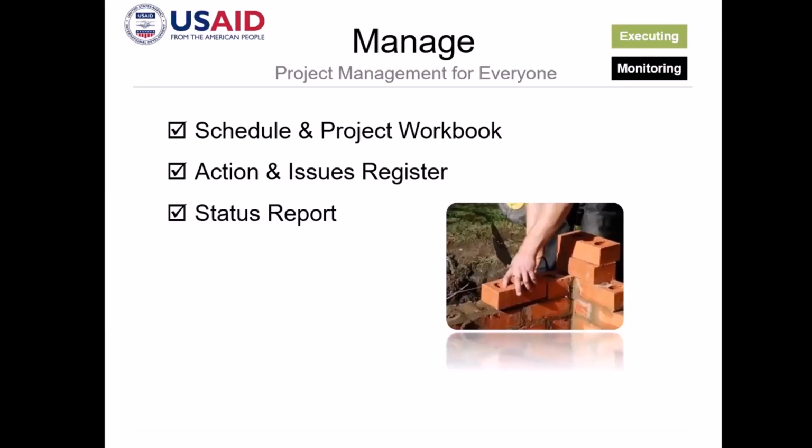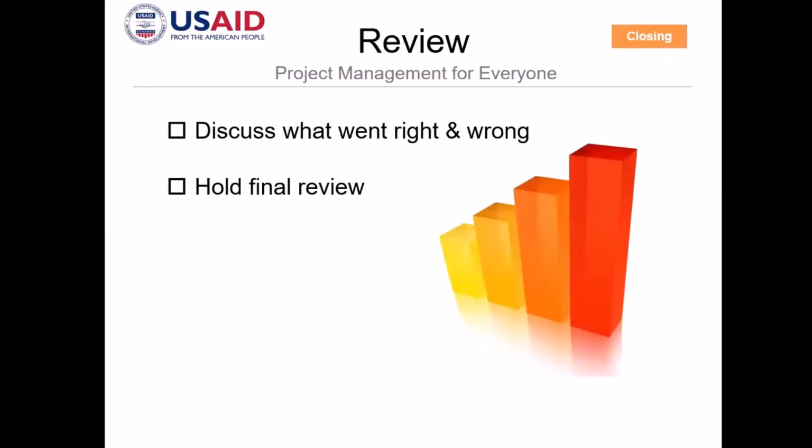By the way, as I've said earlier, when we produce the project plan, the project plan is your binding contract with your stakeholders, right? So basically what I'm saying is the requirements that are listed in your project plan are the things that you will have to deliver. And once the project plan is signed off by the stakeholders, there should be no changes. But in the real world, it doesn't happen, right? Normally, changes happen.